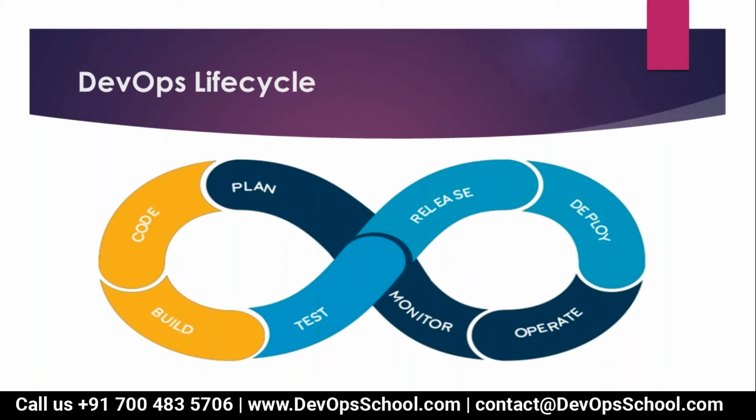In a beta release, they have released only a few features of the application. The full version of the application will come after this month, like that. It depends on the complexity of the application. Getting my point? If you are building application A, and it consists of 100-plus functionalities, but you are not able to complete all of them at once, you are just going to develop the core functionality and then release it into the beta.